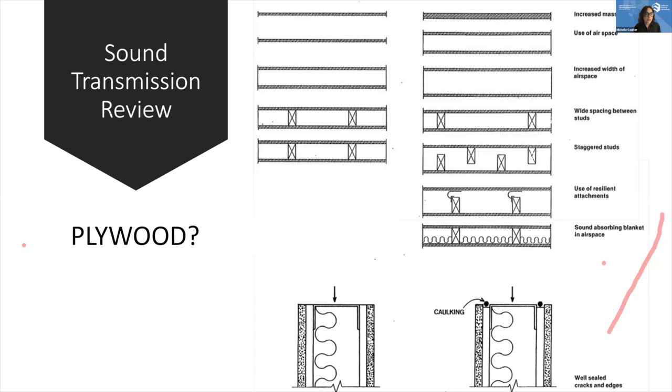And I think it's something that we don't spend enough time thinking about. But that's going to be your job as a project manager: to bring in the advice of your team members and weigh it against your constraints of time and money. And what I would tell you, Michelle, is that it's really important for project managers, if they're using a standard AIA agreement with their architect, to look at their agreement and establish what those milestones are for deliverables early on.